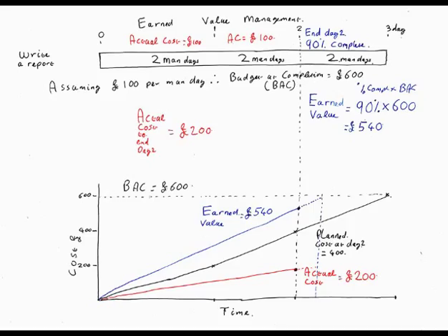So we can actually extrapolate this to say, well, looks like at this rate we're going to finish lunchtime tomorrow. No, you won't, because you've only got 10% of 3 days' duration left. Yes, so we can do some equations to work that out. So 3 days is 24 hours, it's 2.4 hours. Correct. So he's going to finish around about 11 o'clock. About 11 o'clock. At 20 past 11 he'll finish.